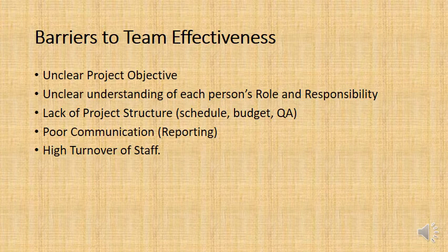Also, when a project goes over many years, you will have a turnover of staff. And when there's a high turnover of staff, that can lead to poor communication. New staff members come in and are not properly orientated to the project. They can be unclear on what their work packages are, what their responsibilities are. They may be unaware of changes in the project that have occurred over time. All of these things can affect the efficiency of a project being delivered.